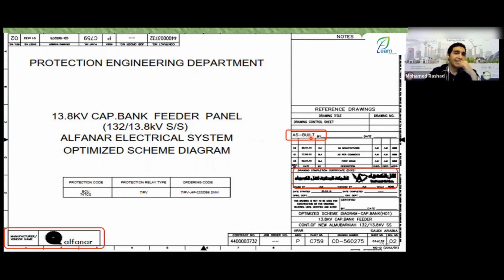After that, these modifications are made to our drawing, and we move to the next stage, the commissioning stage. They might tell you this drawing is at the commissioning stage or refer to the markup. The markup is where you've erased things in green and drawn things in red, meaning you've removed some things, added others, and made modifications. This is what is meant by the markup drawing. And then you take this markup, give it back to the designer, and the designer starts drawing it on whatever tool they are using and returns it to you ready with the modifications drawn in.